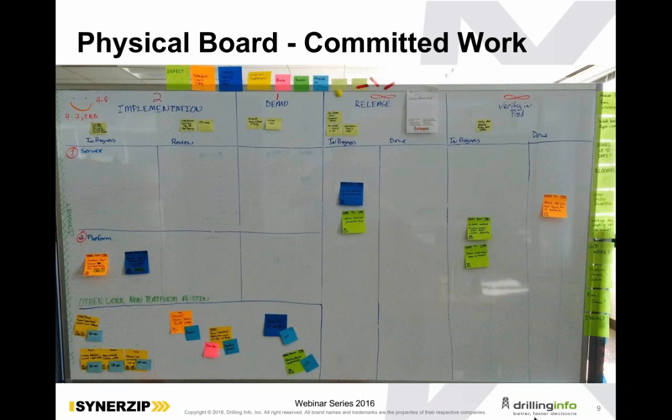Yes, absolutely. If it doesn't make sense to break it up any smaller, I would pull it all in as 20 items on a board and do all those things. Now there's another strategy where you can take those 20 items and run them through a different board. I did this at eBay, where you had the story in one column and then all the tasks or the sub-stories, maybe it was an epic, and then we would run all the stories through one at a time, but we wouldn't pull in another big story. And so you could break it apart and visualize that through your system as well. So there's a whole bunch of different